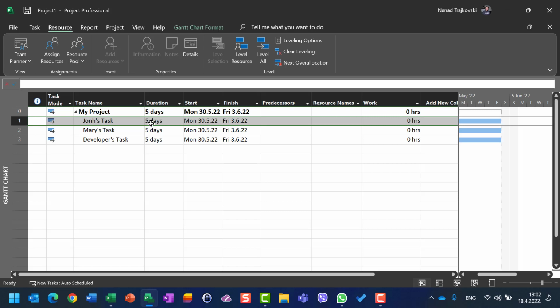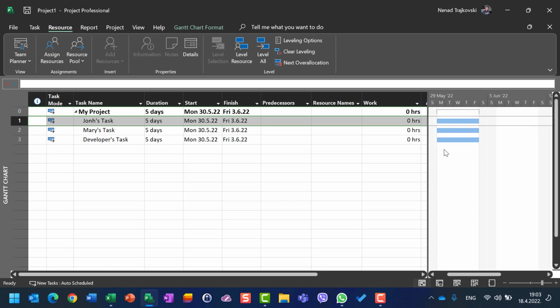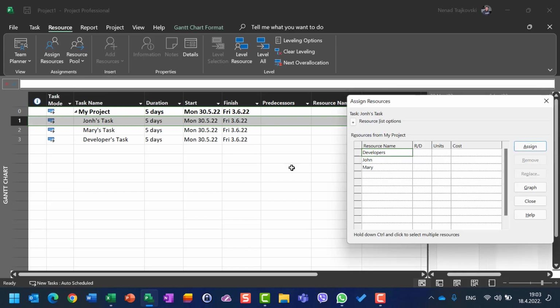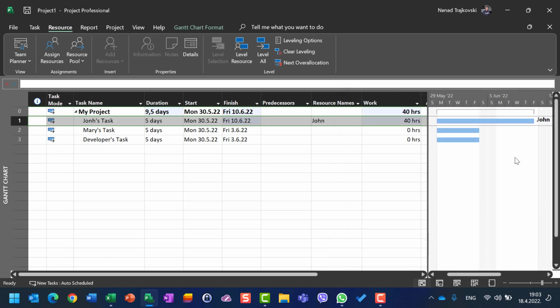Here you will see 5 days from Monday to Friday, remember, from the 30th of May till the 3rd of June. And I'm going to assign John with 100%. When I click Assign and Close, you will see that John is going to work 40 hours.